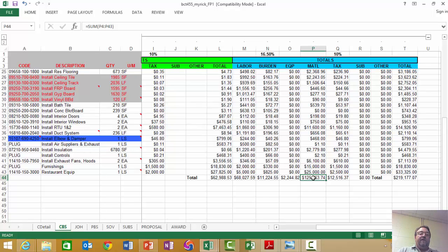And if you do this for a living, you start to realize the bigger your labor is in relation to either material or equipment, what's your equipment to material? Those ratios give you an idea, once you do it for a while, of how much risk there is. And there's obviously more risk in labor than anything else.